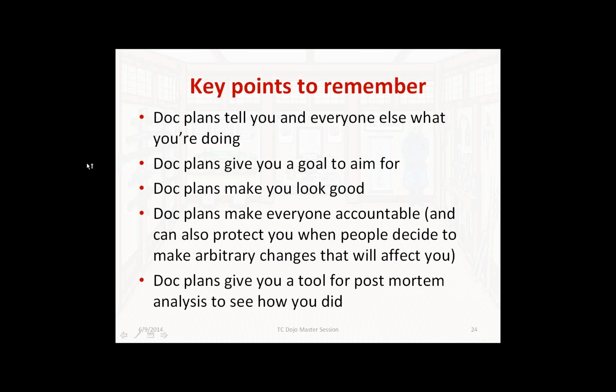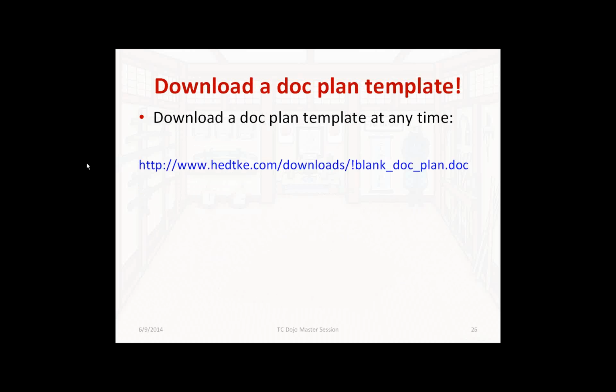It needs to be updated regularly. Changes to the document are usually going to be in the outline, and you should log and re-release it. All of this goes to support the idea you know what the heck you're doing, and this gives you credibility and the ability to negotiate a little better.